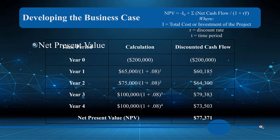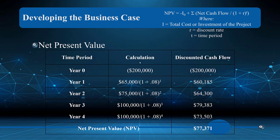Here's what a net present value example looks like on the slide. We have an outlay of cash with a discount rate of 0.08 applied, and an influx of cash — the net present value in today's money is $77,000. We might invest in this project, but if another project under the umbrella of projects supporting the organization scores better, this one may not be the one we take on.